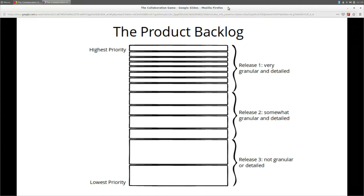Our product backlog, if we're not doing release planning, is more granular at the top and less granular at the bottom. Our latest release has that granularity at the top, and releases are typically lined up linearly against that backlog.